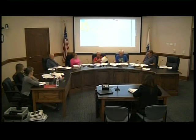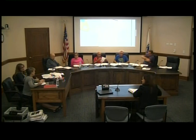What's bothering you? Getting in and out. I think the alternative is an amendment, which is the same end result. We're going to make them comply with these conditions anyway, but the conditions would be in the order of conditions versus a document. They're going to have to notify all the abutters again, and so it sort of comes down to, at this point, there is no abutter to the right. It's a lot yet to be developed with an order of conditions of its own.